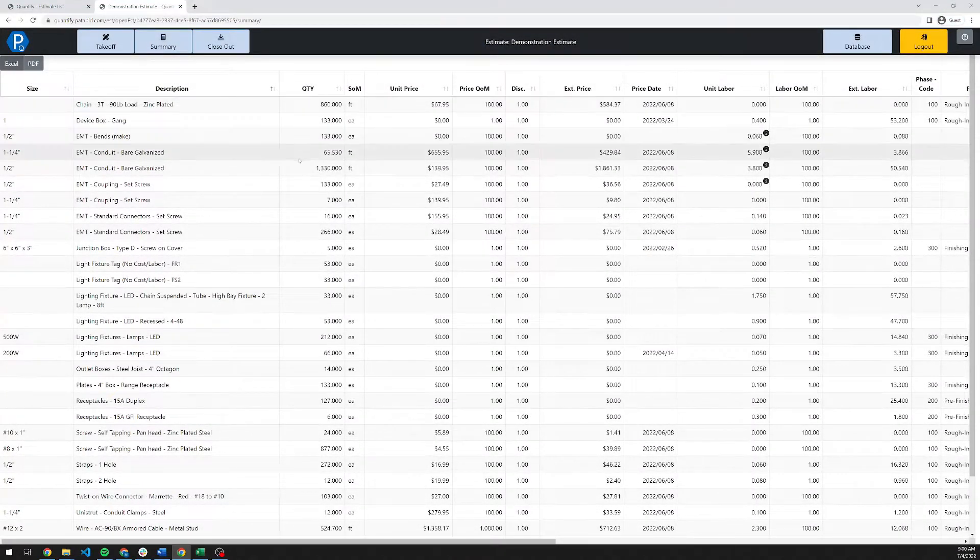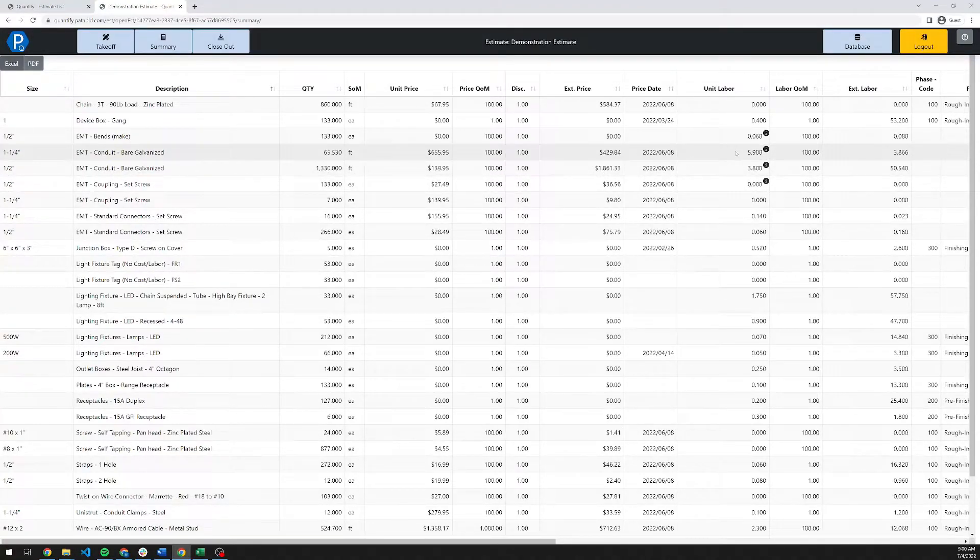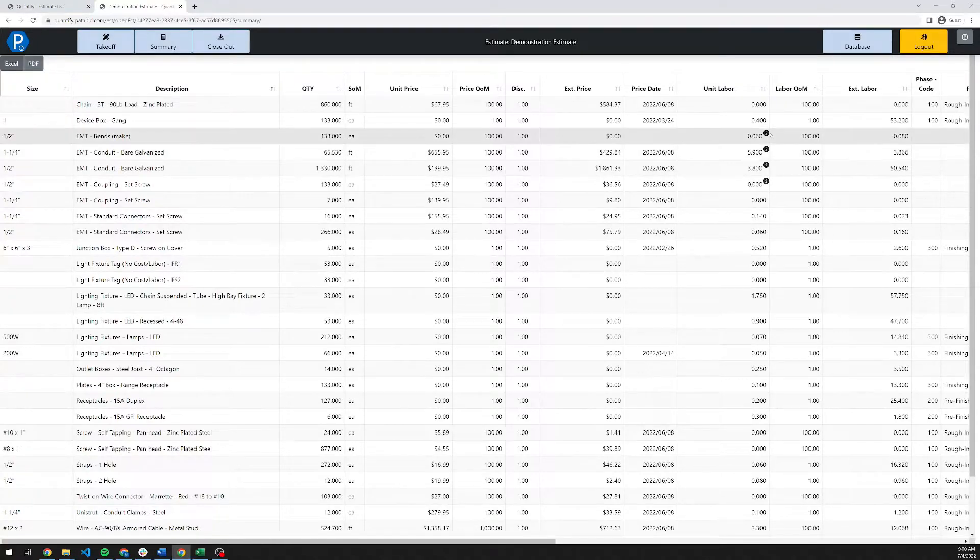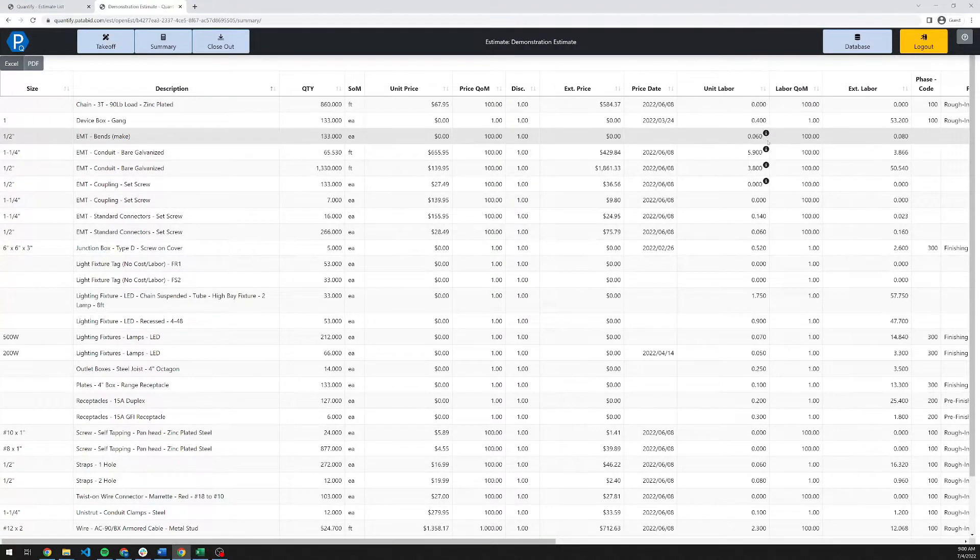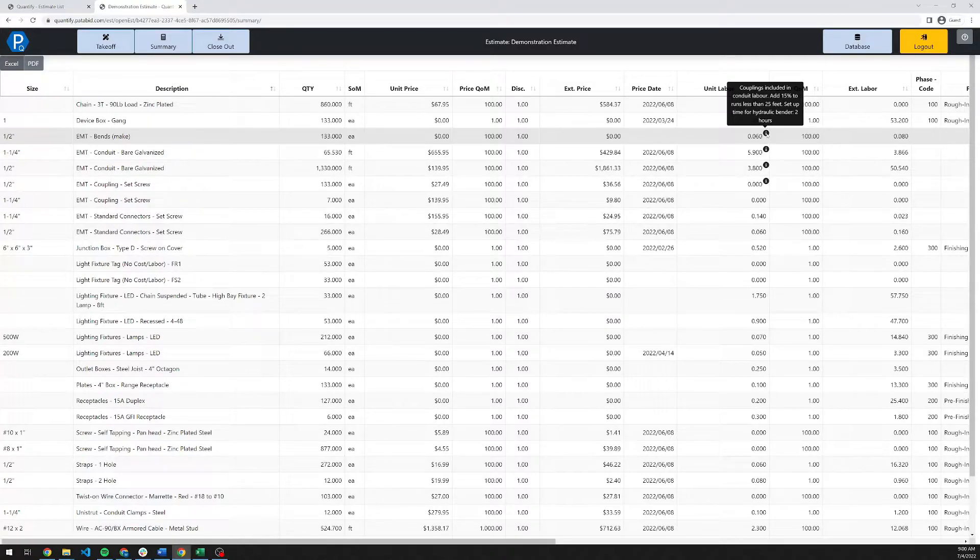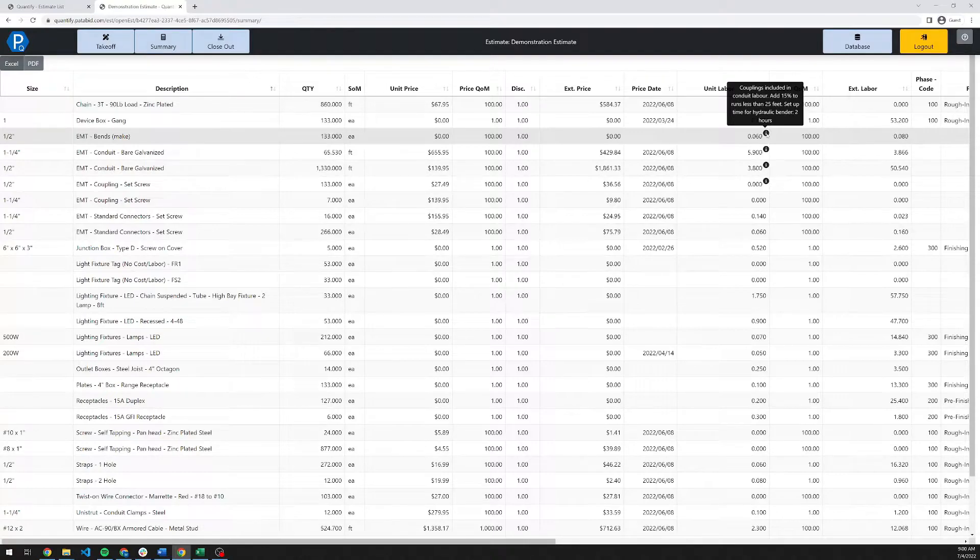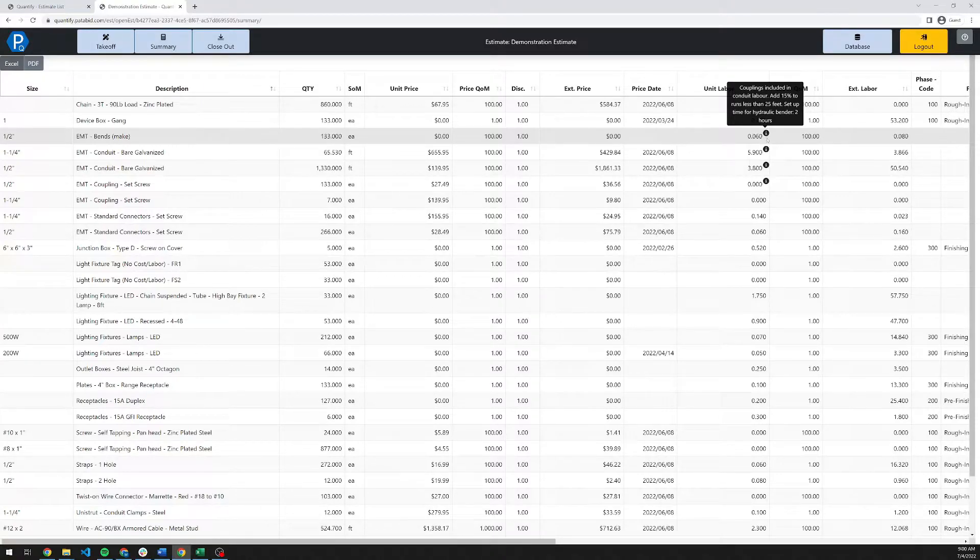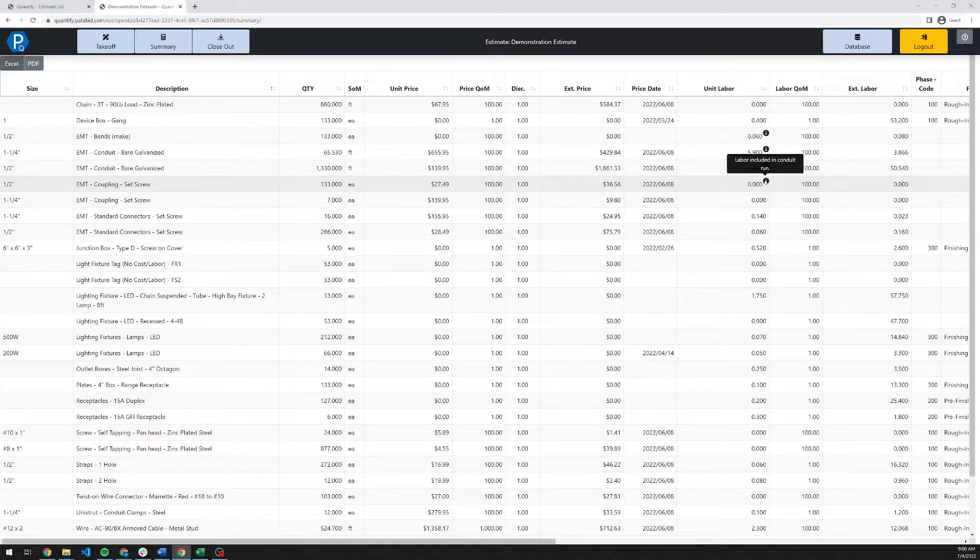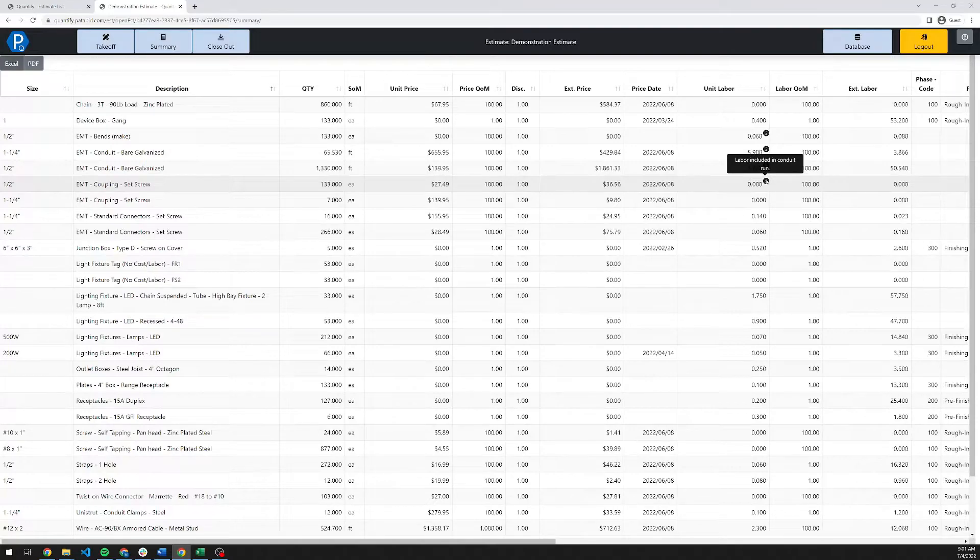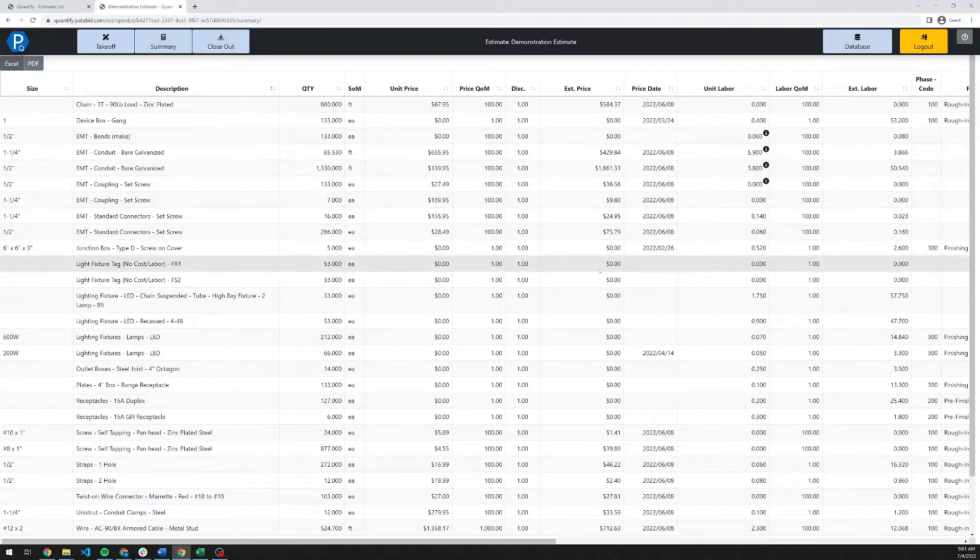There are several other unique features on the summary screen here. Number one is we have partnered with Suderman to bring in their estimating manual in its entirety with, for example, its notes and assumptions. If you see this little icon here, when you hover over it, it will tell you what the basis of that labor is. For example, couplings are included in the conduit run, 15% for runs less than 25 feet. If you need a hydraulic bender, allow two hours to set that up. Down here on the actual coupling, it tells you, for example, this is supposed to be zero hours because the labor for it is included in the main runs.